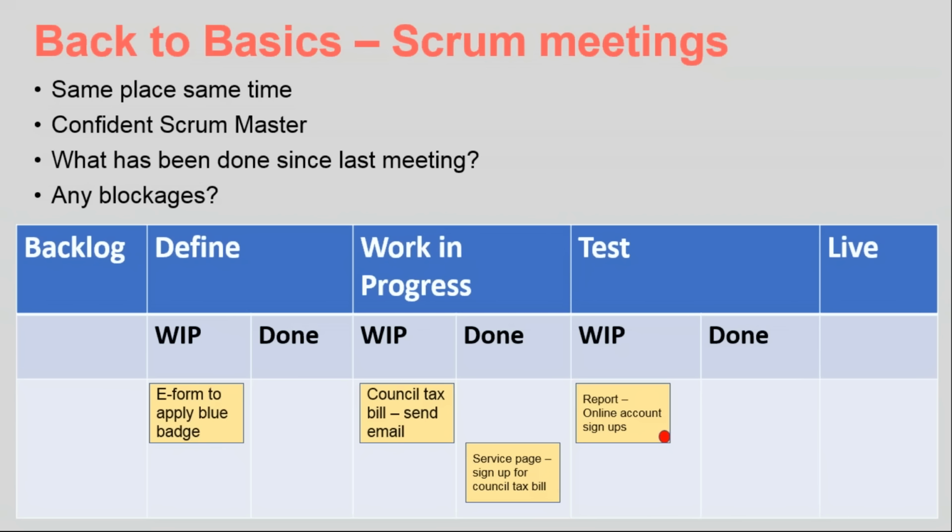When running through the board as well, we had two people who took turns to do it, and in Agile terms this would be your Scrum Masters. Now, I would say don't make that your manager. You don't want to have your manager running it. Instead, I would encourage you to appoint people that are confident enough to stand up and lead and drive the meetings and to take on that role. You probably want people as well who are going to be able to guide the team effectively and stick as close to that time limit as possible. And also the Scrum Masters, you would want them to be able to challenge your team members about maybe why tasks aren't moving along the board, and also be able to capture barriers without really making individuals feel uncomfortable or as if they were being judged.